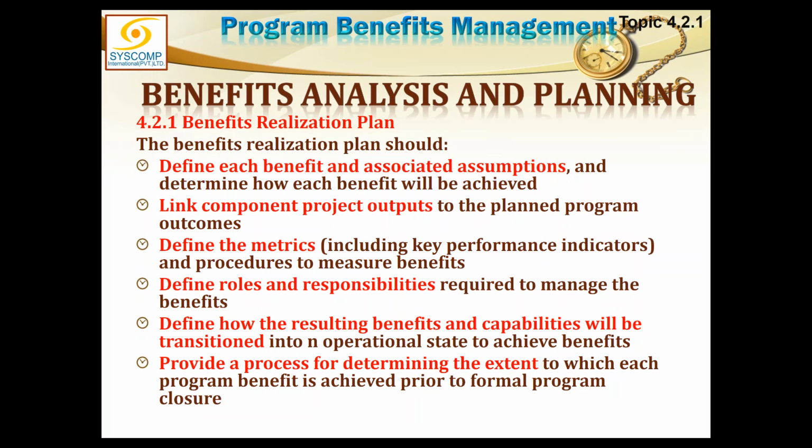And then defining the roles and responsibilities required to manage these benefits. Define how the resulting benefits and capabilities will be transitioned into an operational state for achieving benefits. Provide a process for determining the extent to which each program benefit is achieved prior to formal program closure.